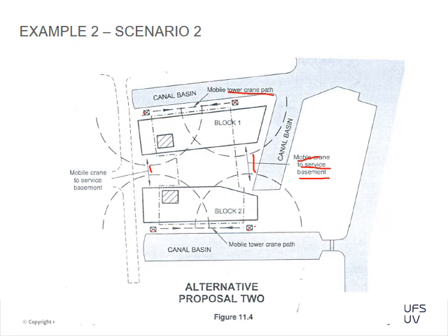Okay. So then you need to go and do the calculation of how much it costs to get these mobile cranes in for temporary site operations. Obviously, your movable jib cranes are cheaper than your fixed cranes. So that's the considerations that you want to do. Okay, so you will see up to this point it's fairly cryptic. It just says this is more or less what we're going to look at or not. Okay, so you guys understand that type of method statement.